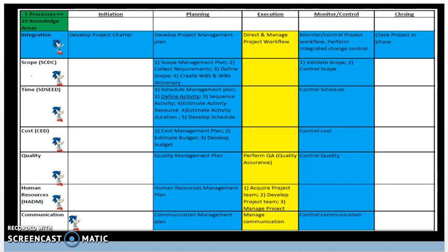The key benefit of this process is it establishes project roles, responsibilities, project organization charts, and a staffing management plan. Note the staffing management plan, along with the org charts and roles and responsibilities, all fall under as a subsidiary plan that fits under the HR management plan. And overall, Plan HR management is used to organize, manage, and lead a project team.